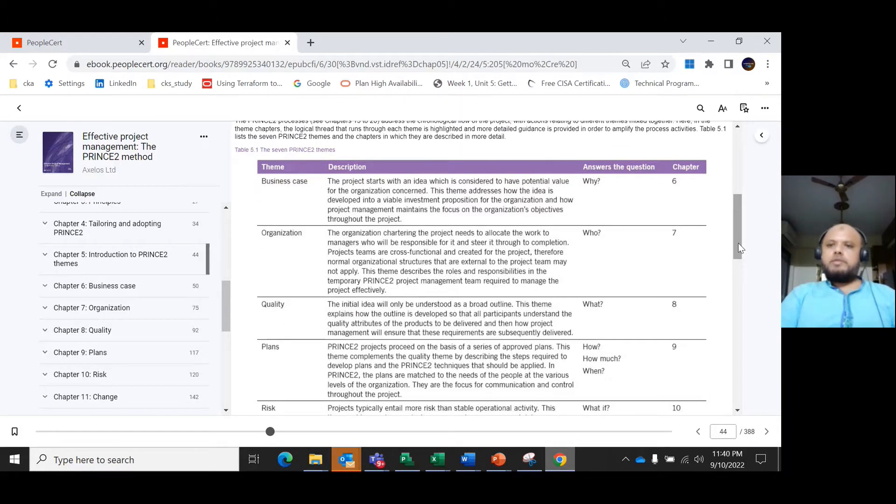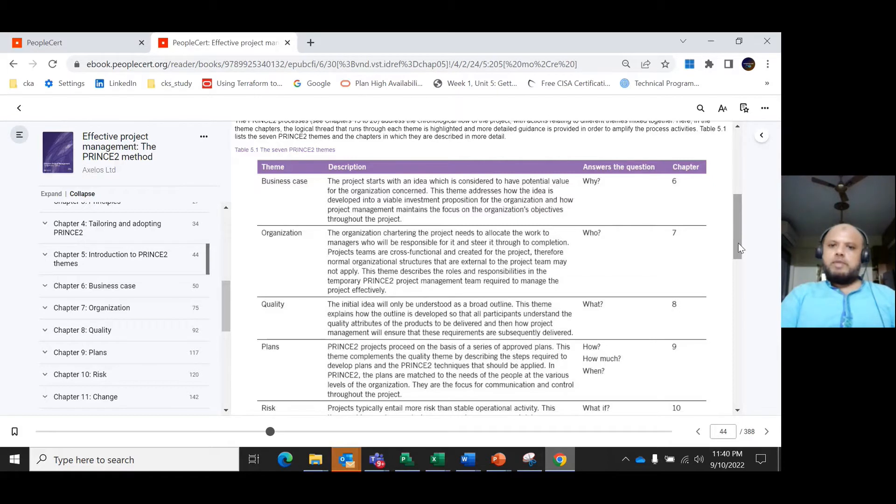The next theme is the organization theme, which answers the question 'who?' Who are the responsible parties? The organization chartering the project needs to allocate the work to managers who will be responsible for it through to completion.